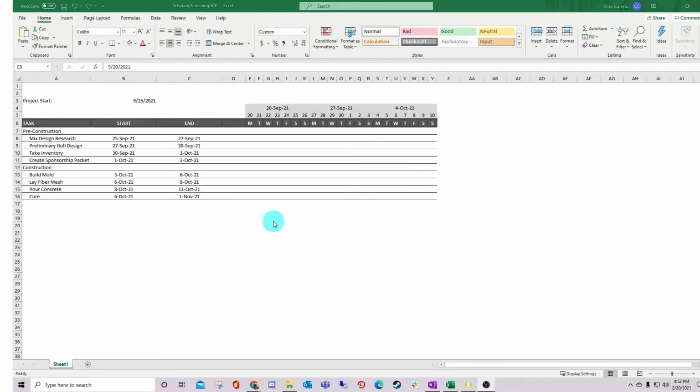First, I'll link the cell E3 to our project start date using equation 3. Then, using equation 4, I'll add 1 day to each of the following dates. Let's extend that to all of the following dates.